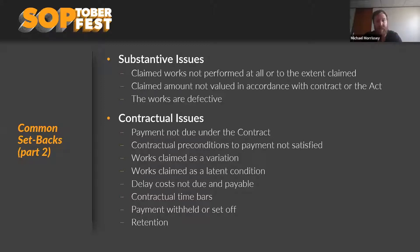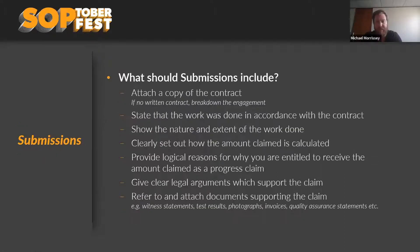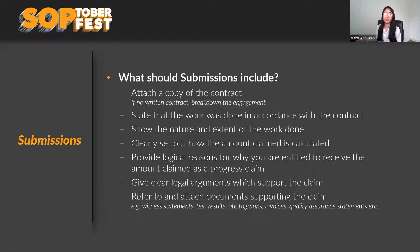Time bars are huge, particularly under complex construction contracts. We're advising on complex infrastructure projects where regimes around claiming additional entitlements — whether variations, time claims, or delay costs — have multiple time bars attached. Where people haven't complied with those regimes, entitlements may fall away. Broad rights of set-off and how retention is properly dealt with are also big issues we still see when it gets to adjudication.